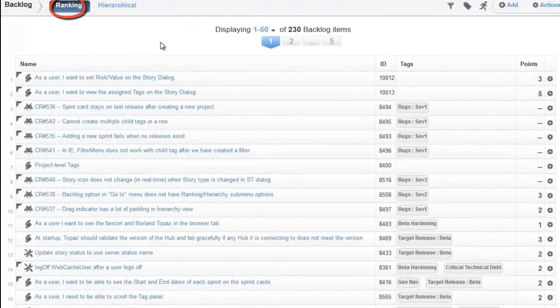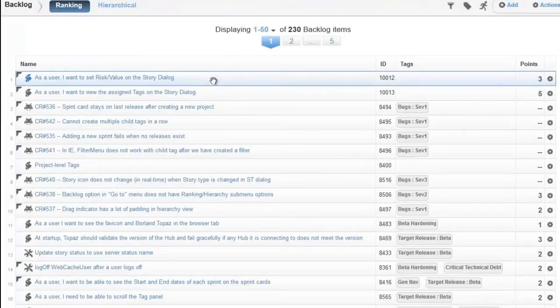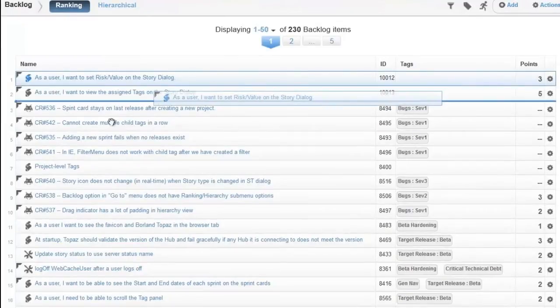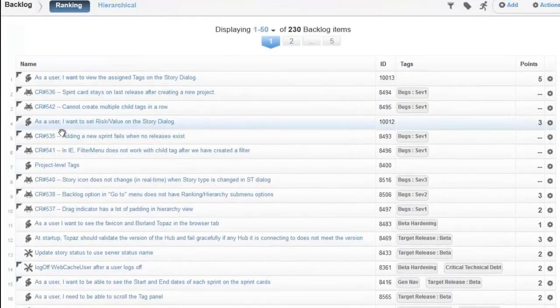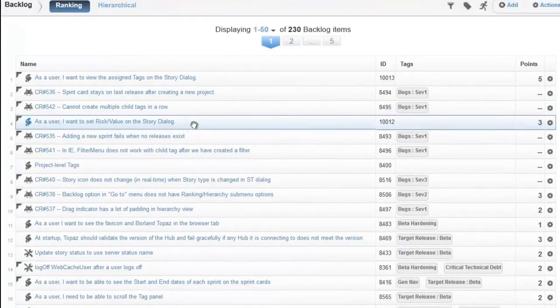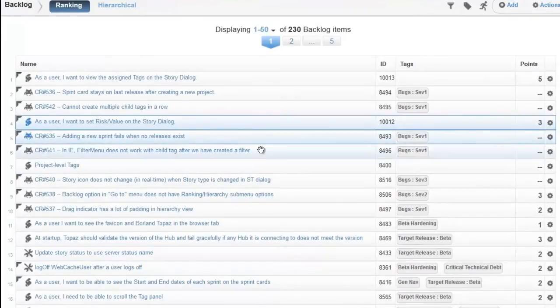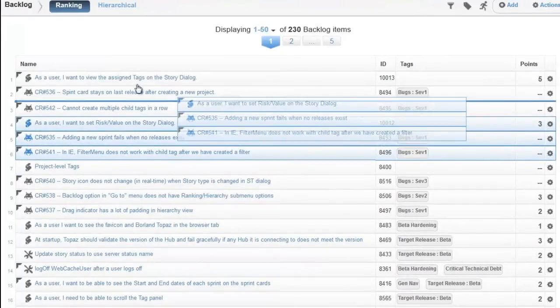The ranking view gives us a prioritized view of all the stories in the backlog. To change the priority, we select a story and move it to the appropriate position. We can also update the priority of multiple stories at the same time.